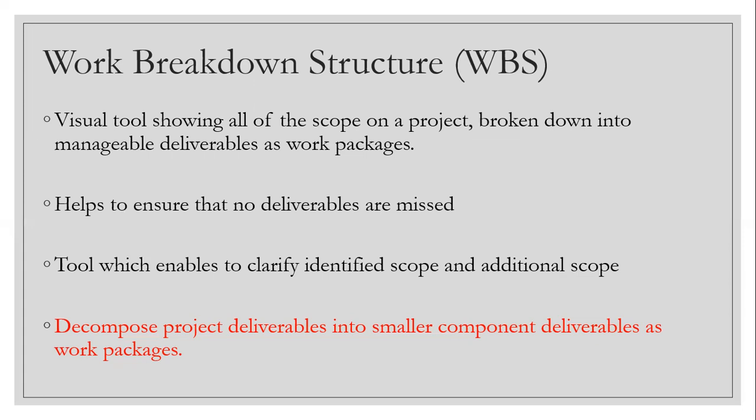That puts the entire project health into an amber or a red status because that was not considered in the beginning. The business would not have told you for some reason which we don't know, and finally that has to be done. That's the demand, and then either you rebaseline, like I said, rebaseline is the last option when the program goes into red, or you probably try to compress things by adding more people into that program. And anyways, I will not say it's an okay thing to do. It's definitely something, it's a lessons learned.